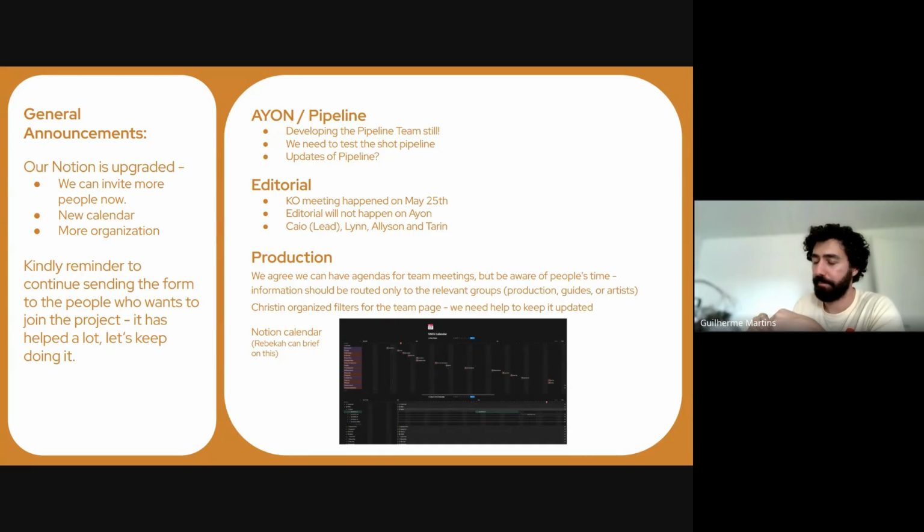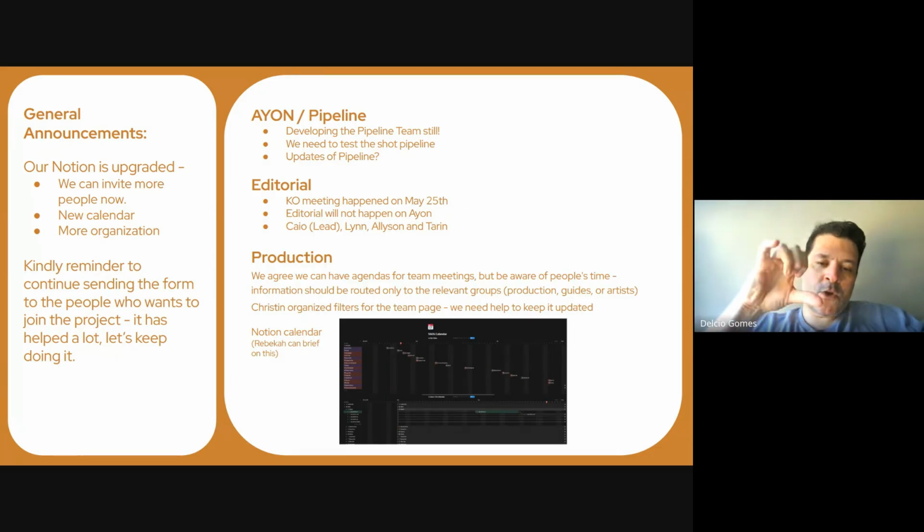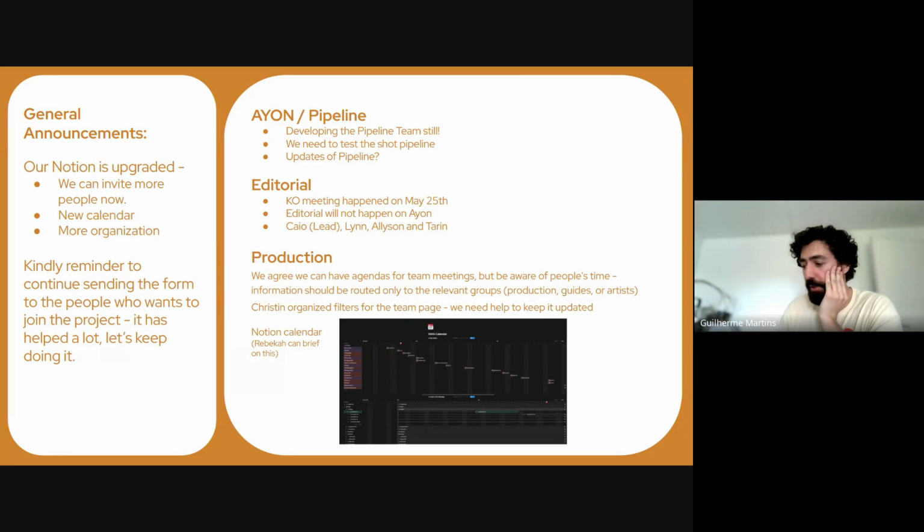Right. Okay. Yes. Because I think the drone and the unicorn are going to be the easiest characters to get done. The Demon Pope is going to come later. So we can work on Lavina, but we're going to need Demon Pope later. Okay, sounds cool. Nice. I just wanted to double check that with you, so Christine and I can start focusing on these ones and get them done.